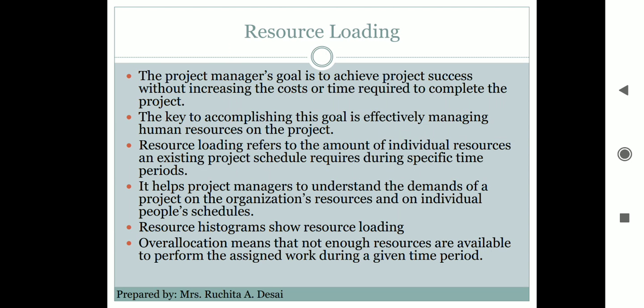One problem in the scheduling process — which we discussed in time management — is that scheduling often does not address the issues of resource utilization and availability. It just gives the time slot for each work but never addresses how many people we have or whether enough employees are available. The schedule tends to focus primarily on time rather than time and resources, which includes the people.